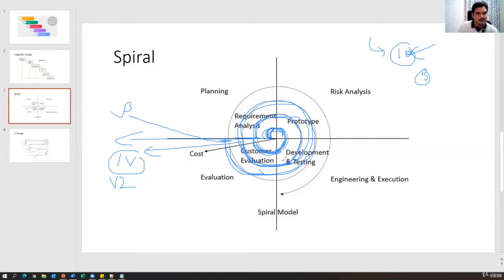So the advantage of this model is that the main intention of introducing it is to accommodate new requirements and also frequently changing requirements. In each and every cycle, after completion of the cycle, we release a new software to the customer. We can also accommodate new requirements or changes of requirements after completion of every cycle. And this cycle will continue endlessly, as long as we keep getting requirements from the customer, we can continue this spiral model.